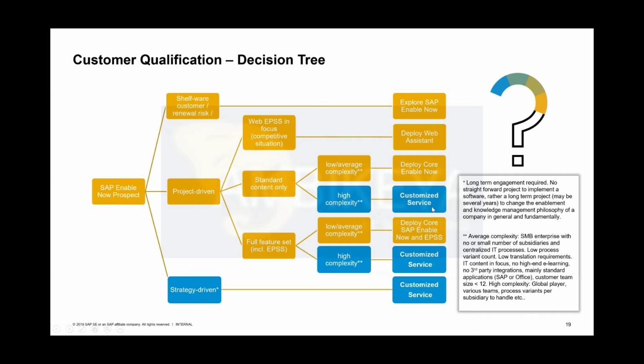If we differentiate, a medium-sized single country company producing bicycles would be very straightforward. And if we have a global player with all countries of the planet having to be taken into consideration for knowledge material delivery and shipment, this is nothing that you can do in 15 days, and this is nothing that happens in a specific time frame.